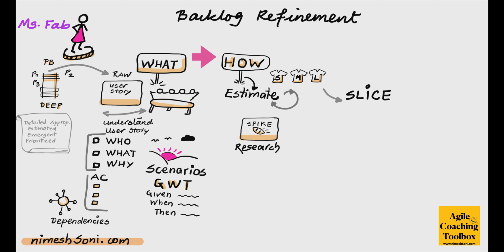We don't want to carry the stories over across the sprints. So we want the stories to be small enough so that the team can finish them within a particular sprint. So I'm going to ask the team to stay on this story, look at it again from several other dimensions and slice it into smaller chunks. All right, so we are looking at the size, the complexity of the story, and the team has identified it as a large story, and we are asking them to slice it.